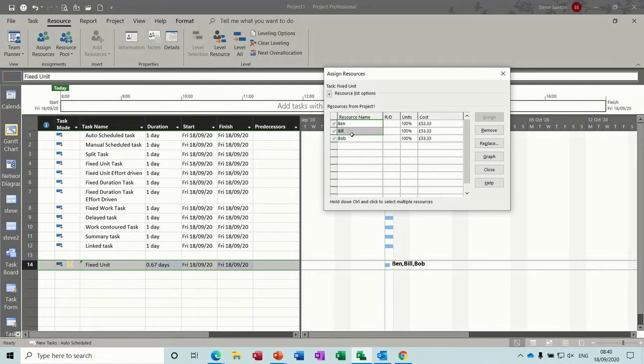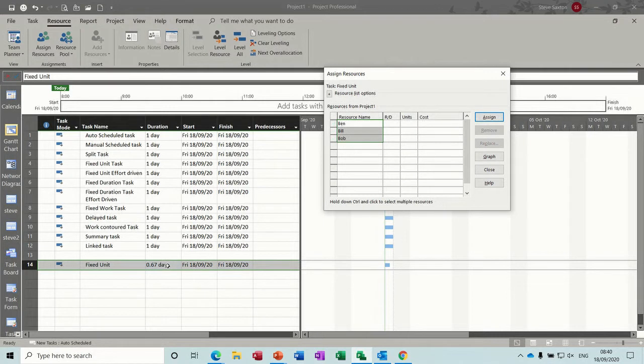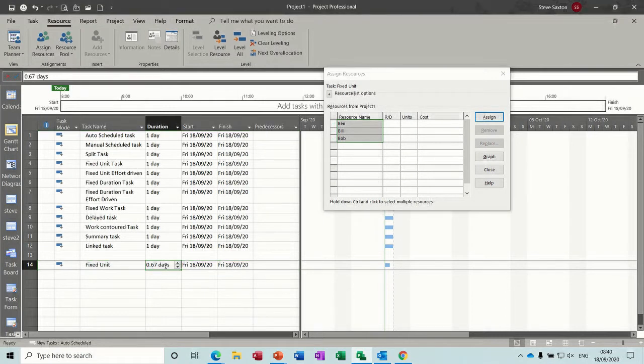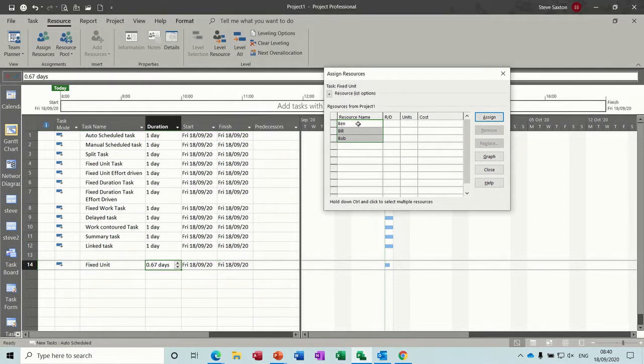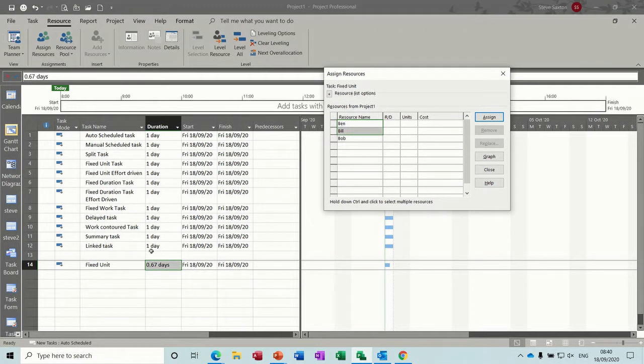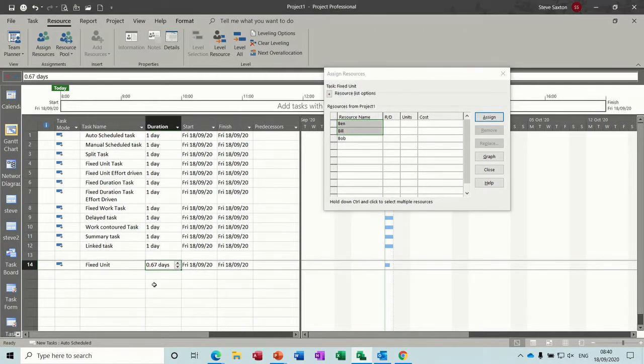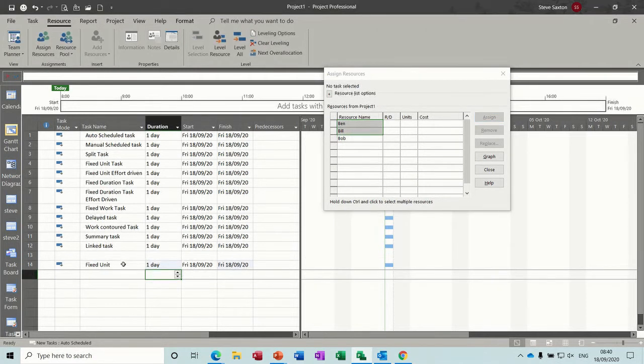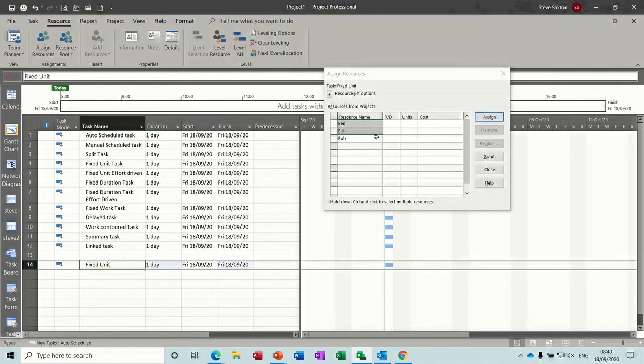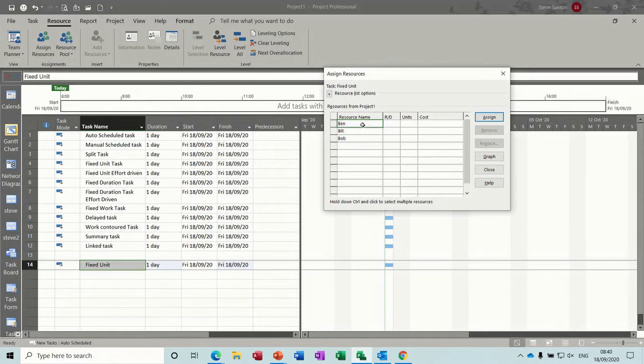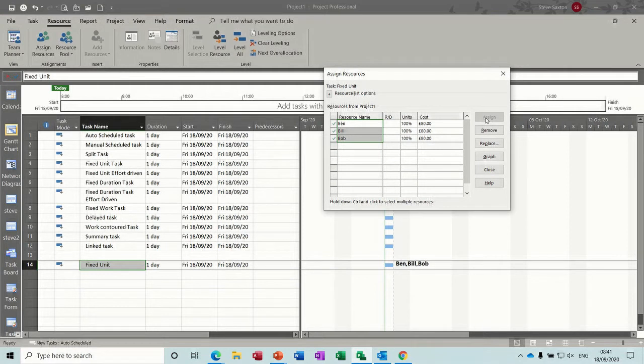So if I remove all three of these, and just put that back to one day. If I add all three together, nothing will happen to that duration, because that's my initial allocation.